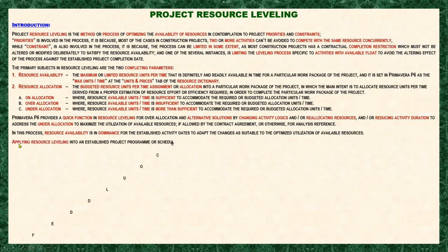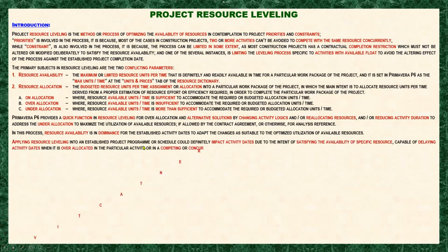Next, applying resource leveling to an established project program or schedule could definitely impact activity dates, due to the intent of satisfying the availability of a specific resource. It is capable of delaying activity dates when the resource is over-allocated in a particular activity or in competing or concurrent activities. Competing has the same meaning as concurrent activities because they are in parallel movement.